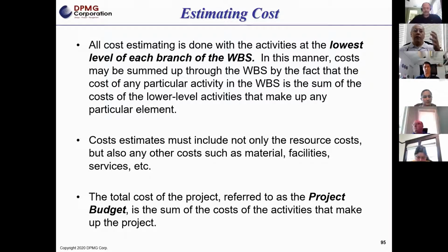So again, when we're looking at estimated cost, you have to look at your activity, the labor hours, and the material cost. From a financial perspective, what I always tell project managers for a first pass is that we need to understand the labor hours and any material costs. That means just the pure labor hours and the labor rate.